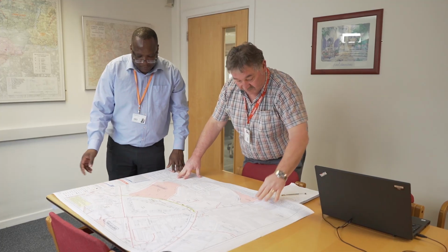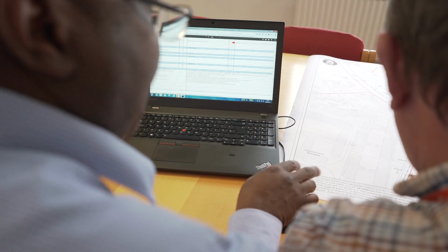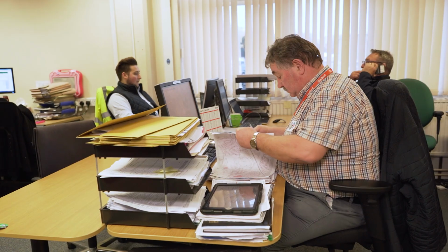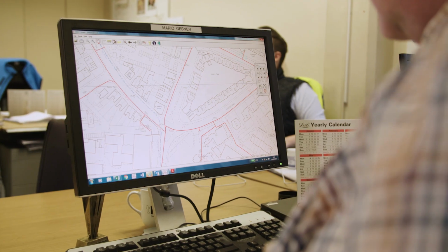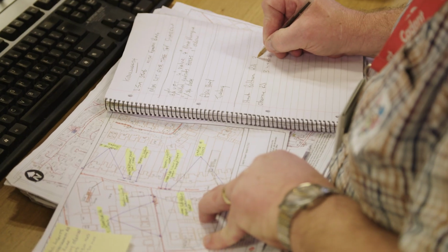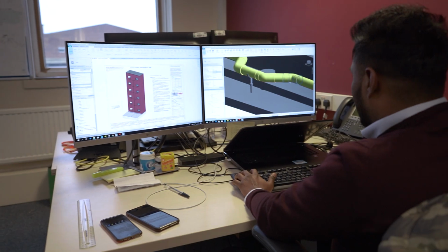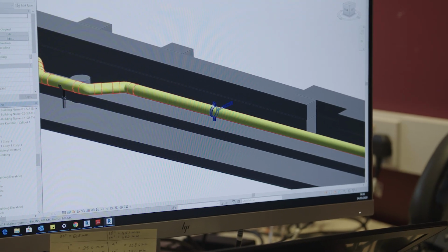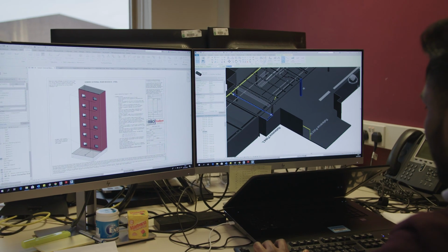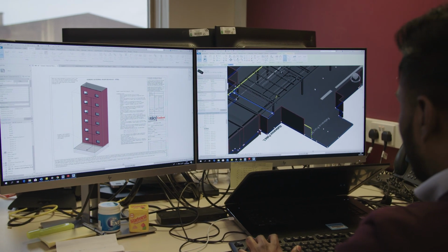A handover session will take place to ensure all information is transferred from the design team to the project management team. Residual risks will be identified and controlled. This will inform construction teams of the detail and measures required during the construction. Our technical connection and digital project rehearsals are a good example of how Skanska are harnessing technology to ensure that we eliminate or minimize all construction risks.